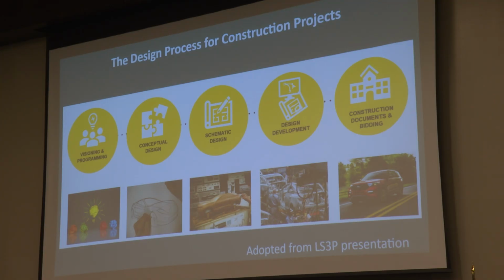We are asking for the max prices to be considered. We will fall under those prices, but to say what the price is would be incorrect. We're asking for the budget to expand. We do not know what the cost of these will be. Right now, we're stuck in design development. We've already finished these stages, which allows us to get to what's called CD, or construction documents. Once we get to construction documents, then we would go out to bid.